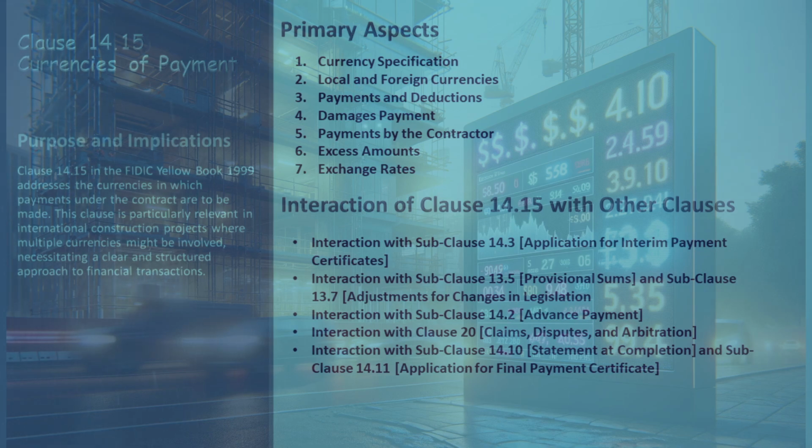Clause 14.15 also harmonizes with subclauses 13.5 and 13.7. This interaction dictates that payments related to provisional sums and legislative adjustments are managed in the specified currencies, aligning with the overall financial framework. Though not directly referenced, the management of advance payments and their repayments under Subclause 14.2 inherently follows Clause 14.15's currency stipulations, ensuring uniformity across all financial transactions.